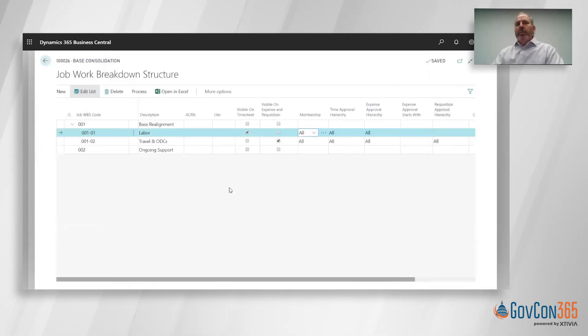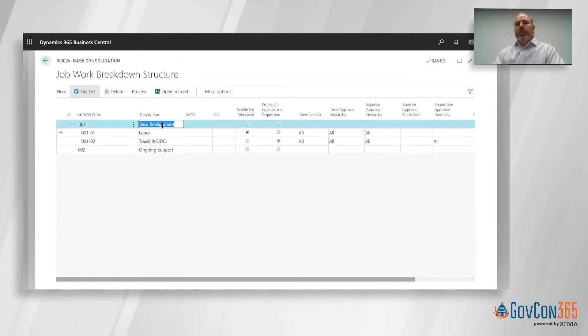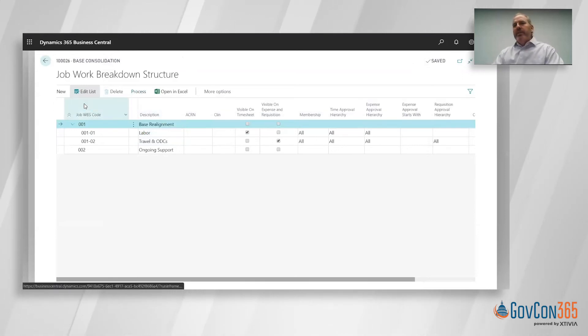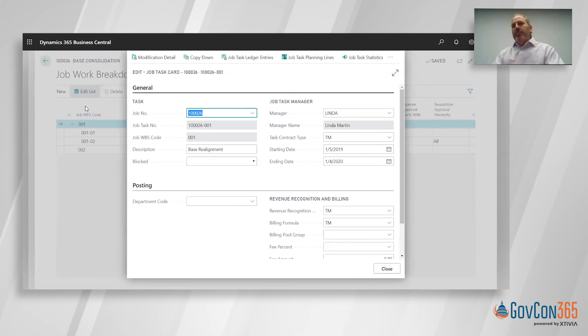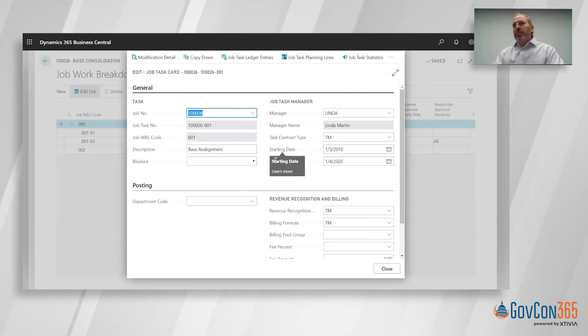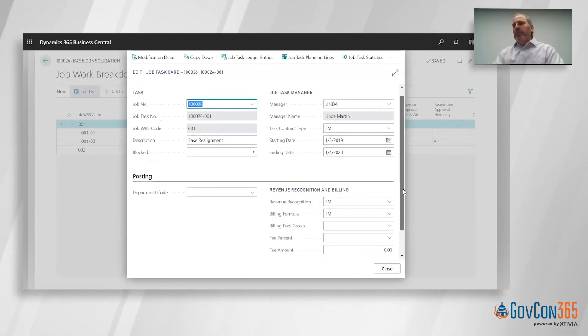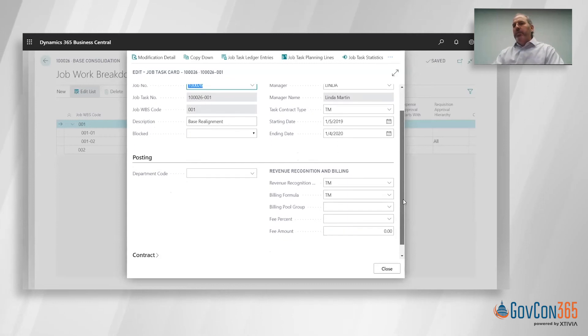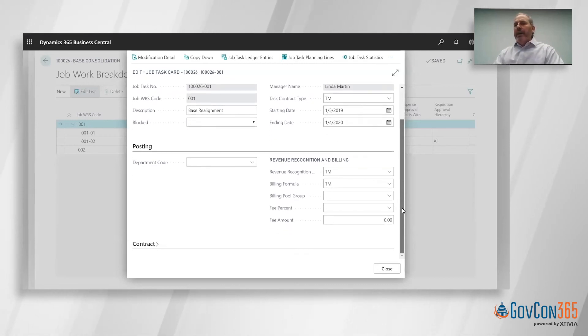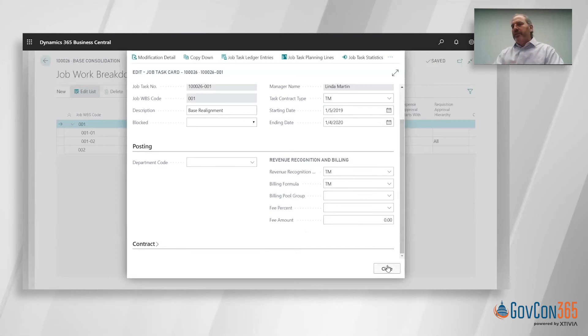The period of performance is set up within our task setup. When I go to the task detail, once you set up the WBS code, it automatically creates this task card for you. Then you can define the pop of that task as well as you could have revenue and billing rules that could be unique to that task, or it could be owned by a different department than other tasks within that job.